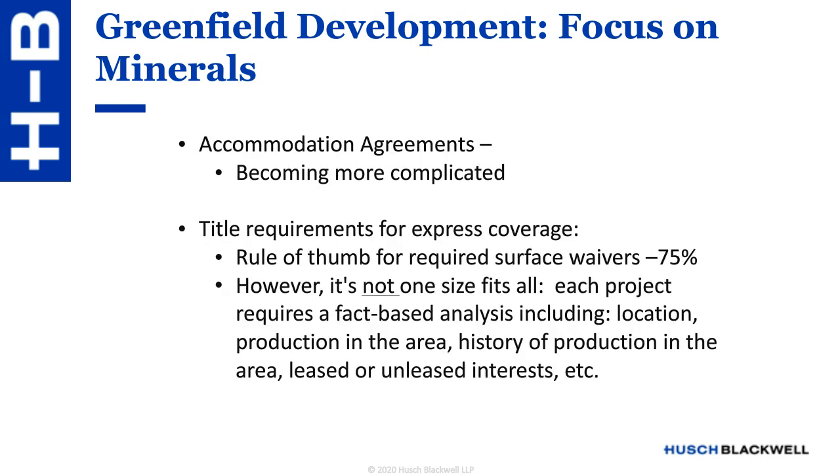So continuing on the minerals focus in Greenfield, as I mentioned, setting aside drill site areas is something you may need to do if you have an active area. The way you do that is you enter into an accommodation agreement with the lessee typically, and that can take quite a while to negotiate. So that's another reason you want to do that early.